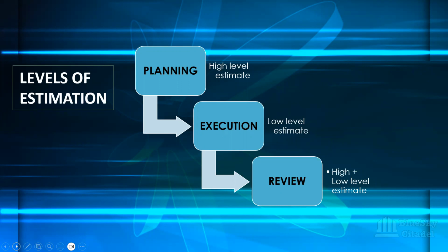They might have put a strategy in place whereby they want that project to go live in a year's time, in 12 months. But by the time they are coming to you, they're not going to give the development team all the 12 months. They're going to give you maybe 3 months or 6 months, because they need the remaining 6 months to do some things. Marketing is still there, and some regulations and compliance they need to meet. So they put that buffer in.